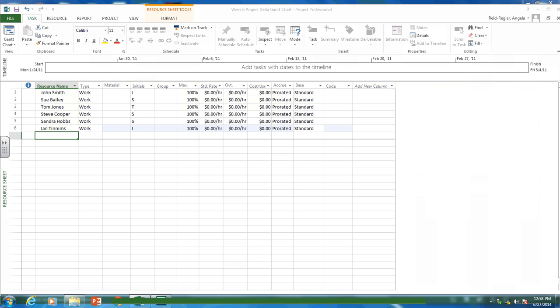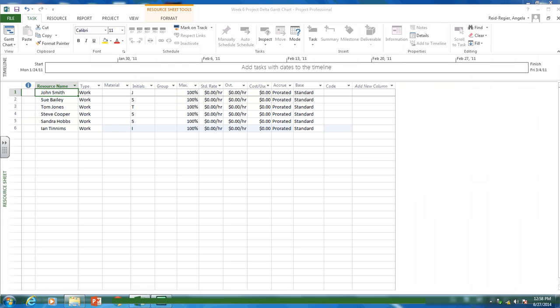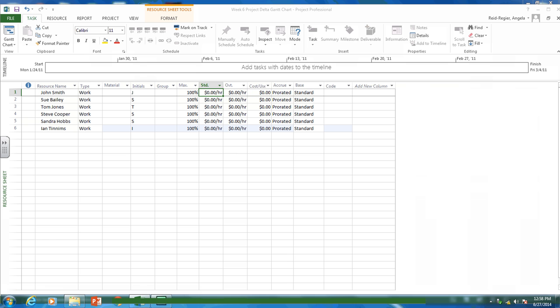So those are three people that are working on this project. And so we've put the people that are working on it. Type means they're work, they're laborers. Maximum means they're available 100% of the time. So full time basis, which is the default in Microsoft project, is an eight hour day Monday through Friday. We don't have rates. You'll look at that in your project cost management. So we're going to leave that blank for now. So there are our resources.